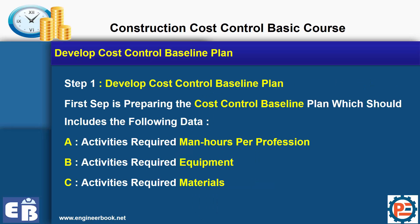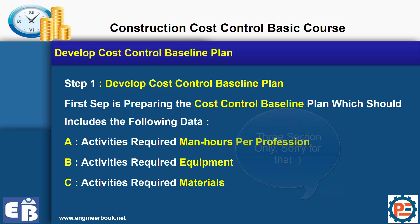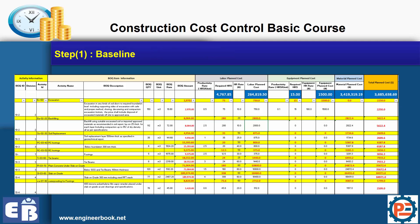In order to develop the cost control baseline plan, we need four main sections: man hours, equipment, and materials. Let me show you how the baseline looks like — it is very simple but very accurate. We have the first section for Activity, second for Bill of Quantity, third for Labor, fourth for Equipment, and the final section for Materials. We do all this breakdown in order to get the total planned cost.